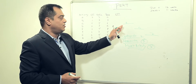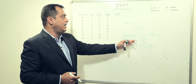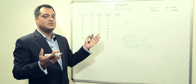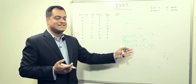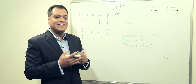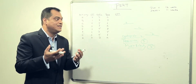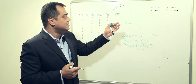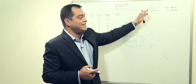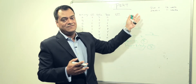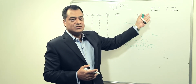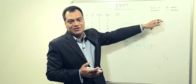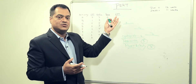We have a situation where we are not sure about the duration of our tasks, so we work with uncertain scenarios. A project manager wants to know whether these guessed numbers are realistically achievable. For example, if the project due date is 12 weeks and we expect to deliver in 11 weeks, we want to find the probability that we can deliver in 11 weeks. That's where PERT helps us derive the values.